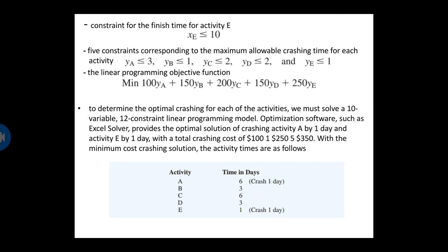The linear programming solution provided the revised activity times but not the revised earliest start time, latest start time, and slack information. The revised activity times and the usual PERT CPM procedure must be used to develop the activity schedule for the project.